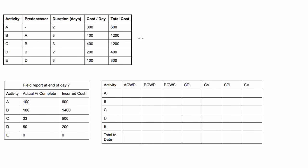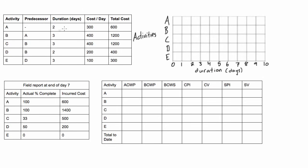In this video we're looking at a full example for earned value analysis. We'll have a table of dependencies, but in this case we're given a field report of what's actually happened in our project at the end of day seven. First of all, let's go ahead and draw our Gantt chart. Activity A is at the beginning of the project because it has no predecessor.